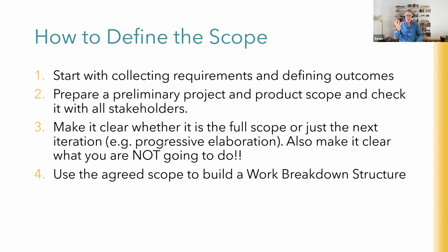Was there any issue with carpentry in the roof cavity? No. Was the power board able to take the extra load? Absolutely. But they just made it absolutely clear, because I know that had I accepted the other quotes and the power board needed to be upgraded, I would have gone, but I just assumed you would have done that. And they would have gone, we never do that. Anyway, so that's what you want to do. Make sure you do the exclusions as well.